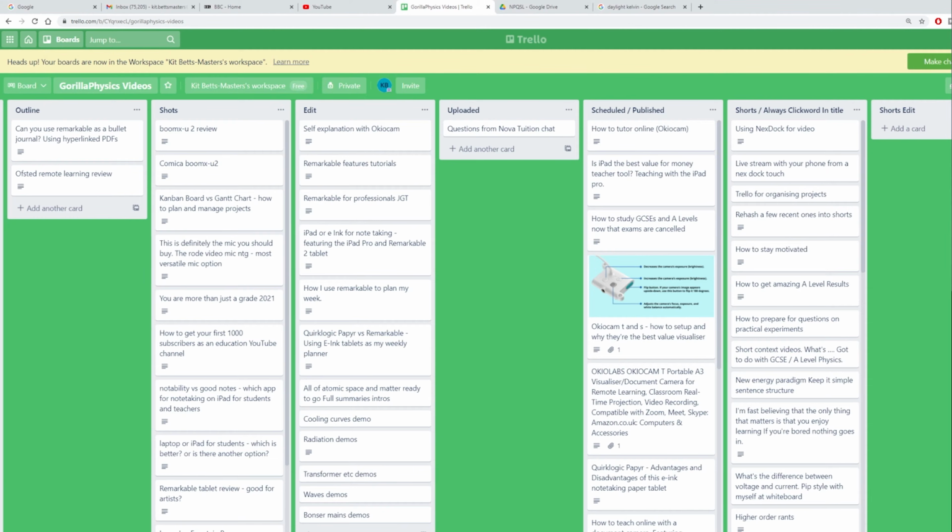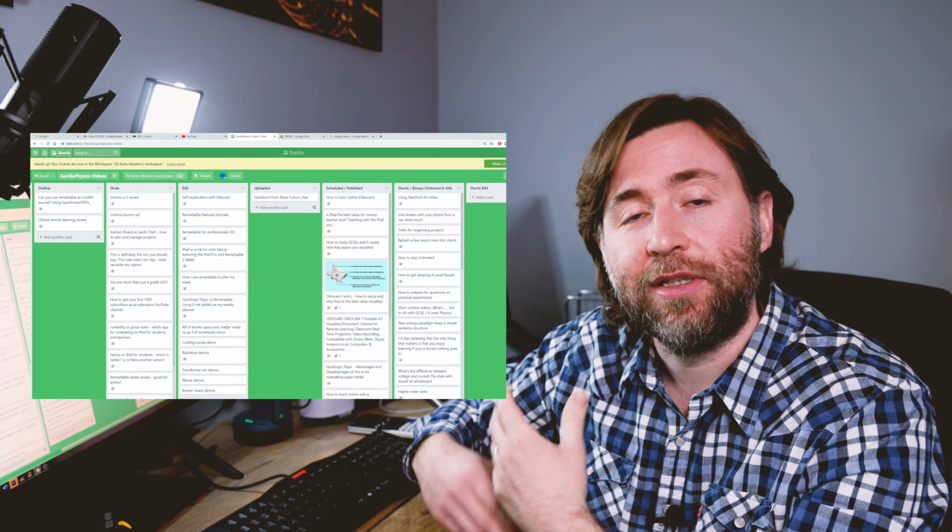Kanban boards are really well suited to projects that don't have delivery in a certain time frame. If things need to happen at some point, usually as quickly as possible, they are really well suited there. Things can be done quickly and in a really efficient way, and importantly, it's a really great way that teams can collaborate because anybody can pick up any card at any time and move it along its production process. As long as each person knows that step-by-step nature of your production process, then they can all contribute.